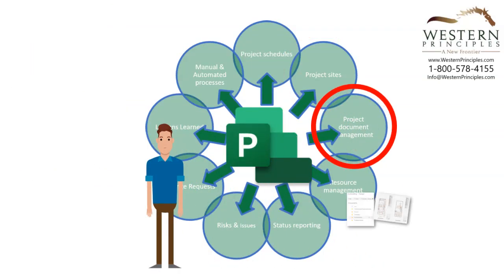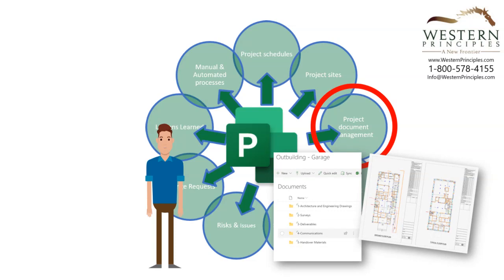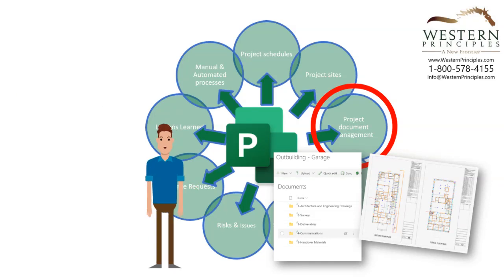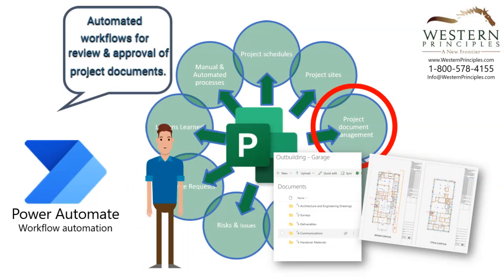Microsoft Project Online's project document controls come courtesy of its SharePoint heritage. SharePoint is a powerful records management system, providing all the things you should expect, including version control, check-in and out, metadata, powerful search, and more. You can define a folder structure as part of your site template so that you can reliably find and use documents on any project. Using Power Automate, you can easily create document review and approval flows.